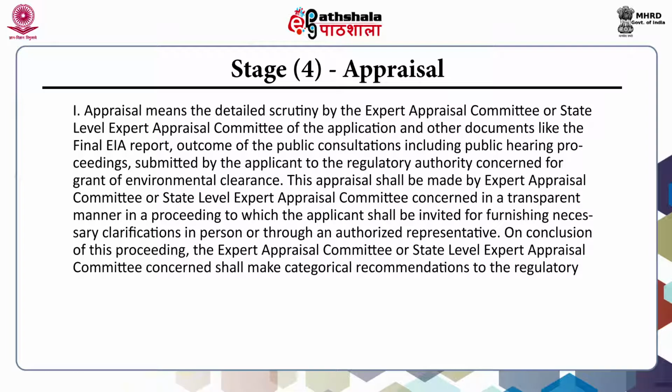This appraisal shall be made by the Expert Appraisal Committee or State Level Expert Appraisal Committee concerned in a transparent manner, in a proceeding to which the applicant shall be invited for furnishing necessary clarifications in person or through an authorized representative.